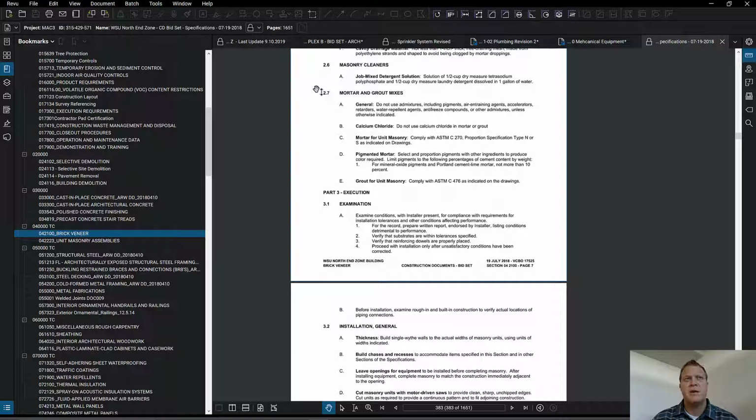So if you have a type of contract that's maybe more towards a time and material type contract, or something where the units are not able to be known in advance, it's difficult to tie in a schedule if you don't know exactly how much you're going to be moving. Anyway, demolition's a good example. Sometimes people don't know exactly how much material is in there. Sometimes you do.